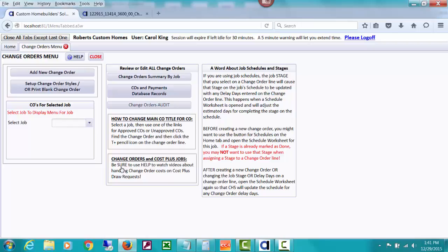Now you'll see in some following videos how I'm suggesting, if you're doing cost plus jobs, etc., you can mark change orders as paid even though you're drawing for the whole amount of them in one cost plus markup or cost plus builder fee draw, and perhaps a percent complete draw. You might be getting the entire draw, and that includes change order amounts, and you'll see that in the following videos. But like I said, this will just be a simple video about as if you received a check for a change order or a couple of change orders and post them on the deposit window.